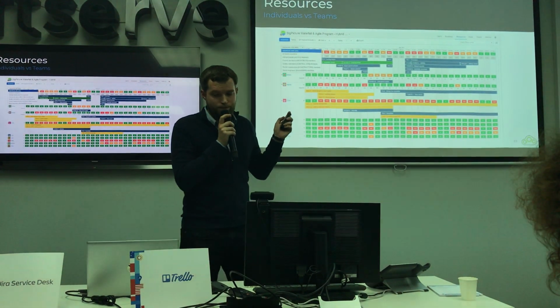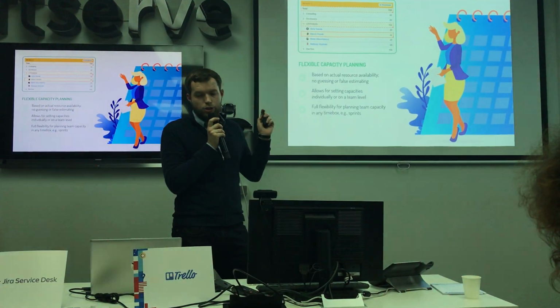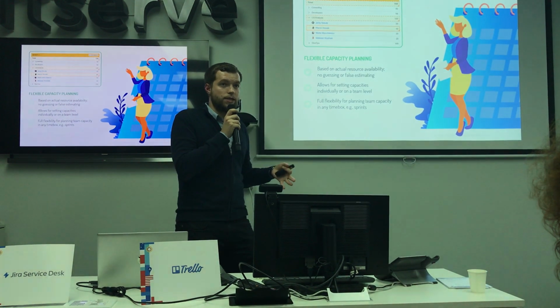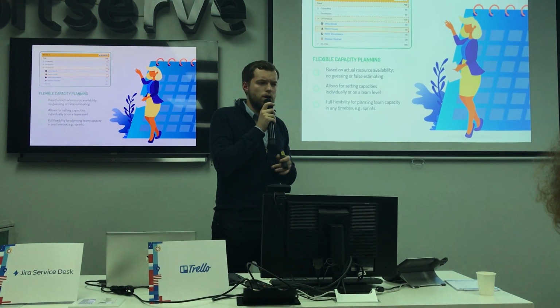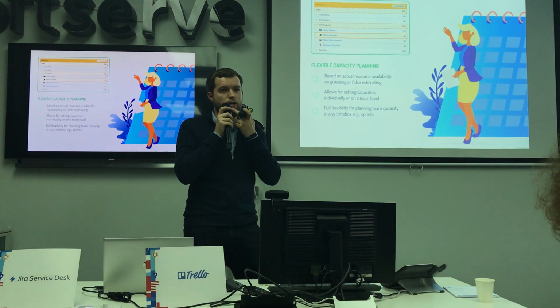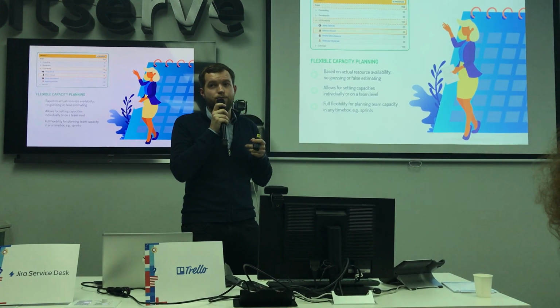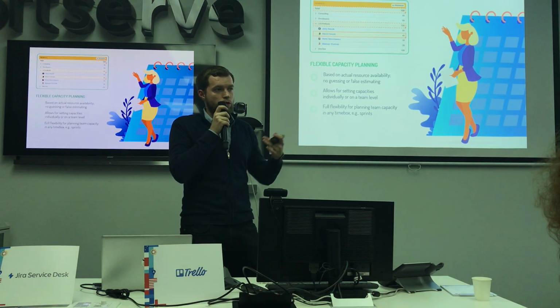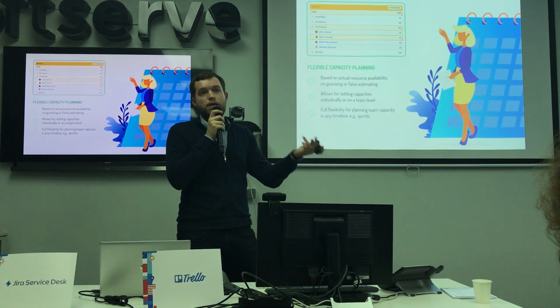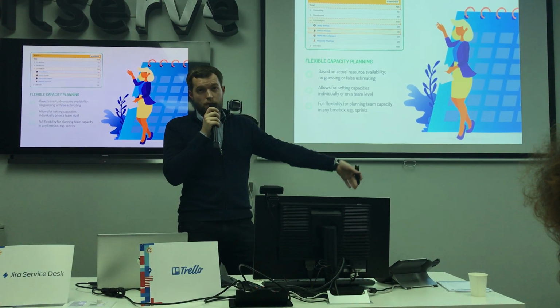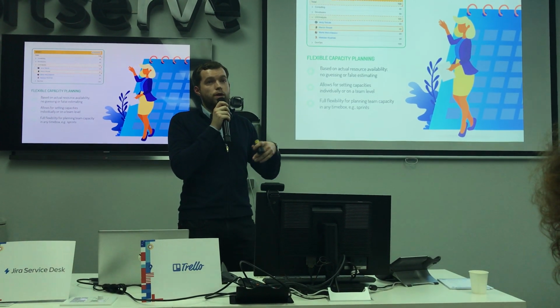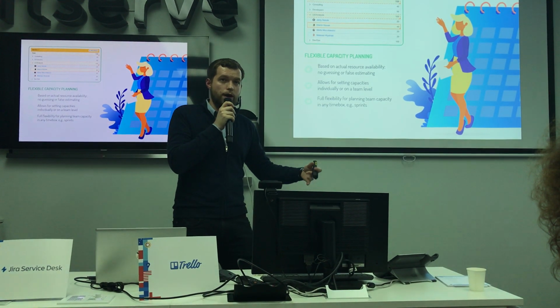I would even add that each team has its own workload plans. A lot of JIRA plugins allow this option to manage workload plans. So you can specify that Saturday and Sunday are holidays, while other days are working, and each working day should be 8 hours.